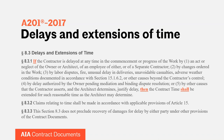I agree — this one's pretty black and white. I can't even think of a factual pattern that would lead me to say no, you don't get a delay when the governor has shut down your construction site. Compare that to a contractor claiming a delay because it rained 10 days in January when the typical is 7 — that's not what this provision is about. When a governor says you can't work, that's exactly why 'other causes beyond the contractor's control' language is in this contract. A difficult argument to make otherwise.